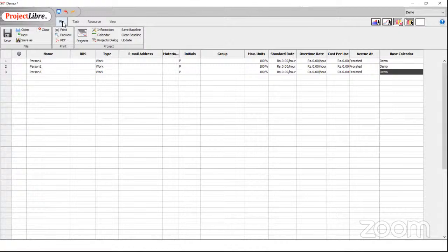So, in resources, if people are using services from somewhere, right? Rentals, for example, which will depend upon how much time the project takes, then is that linked up here? See, you're discussing a resource which is costing you money, but not really impacting your project timeline. So you only put in those resources here which are actively performing work in your project. Don't bother so much about the resources. Just put in the people who are going to be the responsible people for all the activities which form your timeline. Other resources, leave it out of this.